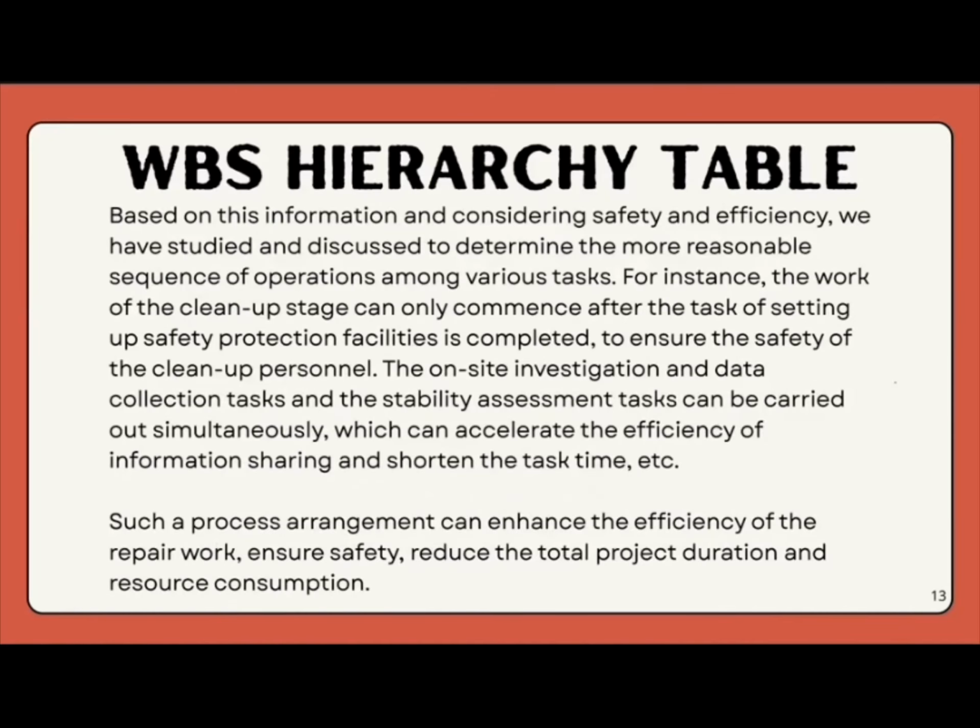Based on the information and considering safety and efficiency, we have studied and discussed the determination of the most reasonable sequence of operations among various tasks. For instance, the cleanup stage can only commence after the task of setting up safety protection facilities is completed.